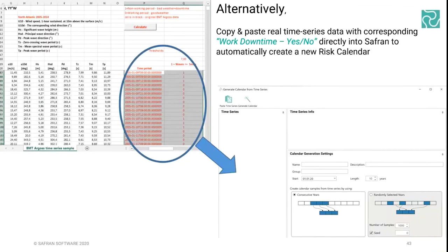You actually find this under the sample data, which I mentioned at the very start, from the burger menu. Go to open the log file folder. We've got some sample data there, some sample projects. This spreadsheet's in there. What you can do with this is, if you've got the actual real life telemetry from a weather station, for instance, wave height, wind speed, and these kinds of things, just add a column and then put in a formula that says if greater than X, then 1, if not, then 0. That simple logic 1, logic 0 is enough information.